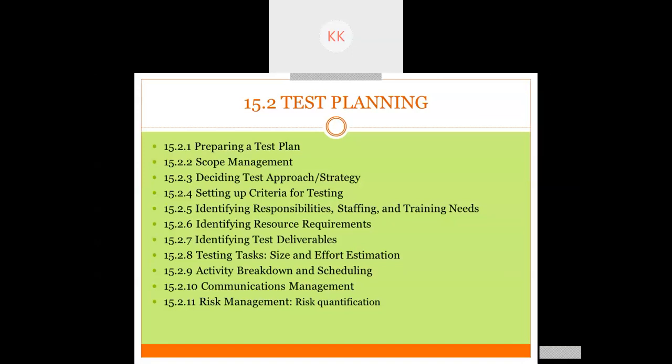We can calculate the pages and database relations which are available, and depending upon that, we can find the size. Mostly for testing, we can identify it using the number of modules and the test cases required to execute that module. That can be the size for the testing task. Then we need to break down those tasks into smaller units and schedule them so that they are manageable. And then next was communication management.